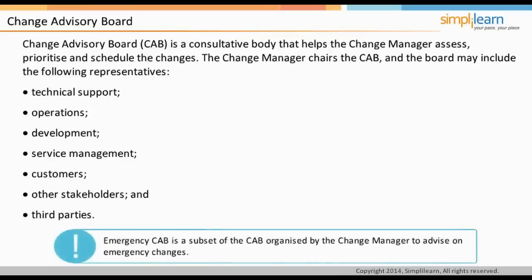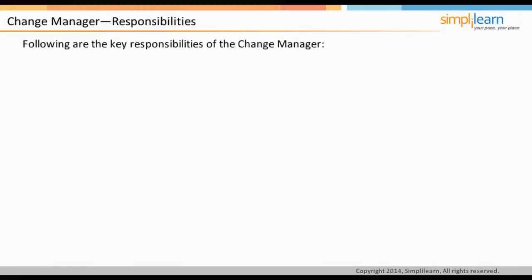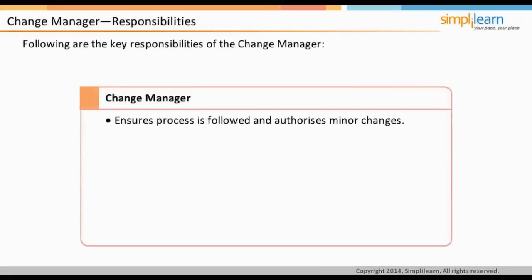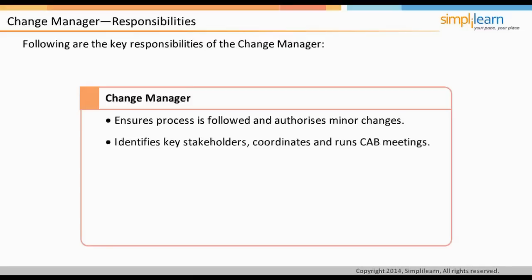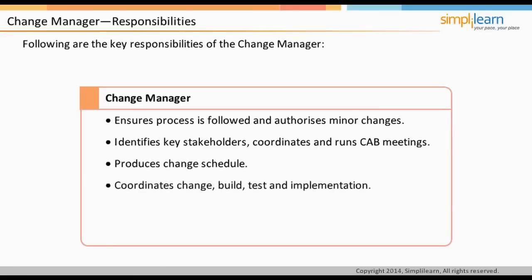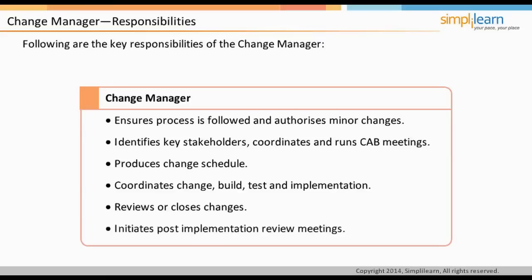Emergency CAB is a subset of the CAB organized by the Change Manager to advise on emergency changes. The key responsibilities of the Change Manager are: ensuring the process is followed and authorizing minor changes; identifying key stakeholders and running Change Advisory Board meetings; producing the Change Schedule to ensure all changes are scheduled without conflict; coordinating change build, test, and implementation; reviewing and closing changes by collating all documentation; and initiating post-implementation review meetings with the CAB.